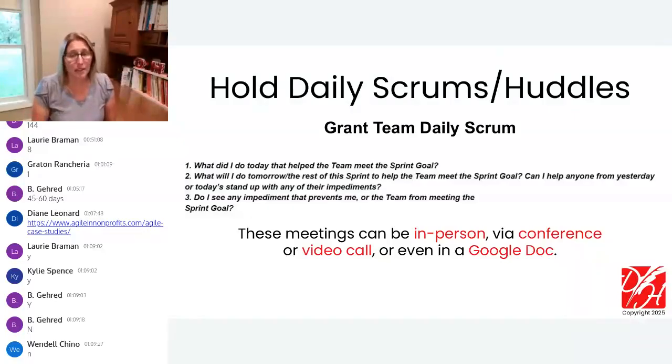However it happens, whether it is happening once a week, because that's the appropriate cadence, or maybe when you get closer to a deadline, it literally is every day, it is a time of 15 minutes or less. The point is to bring the team together, anyone and everyone that's available on the team. If someone's out sick, if somebody's in a meeting, it's okay, we still do it anyway. And asking yourself collectively, are there any impediments? Is there anything that's a barrier? Is there anything that's keeping us from getting this application in?